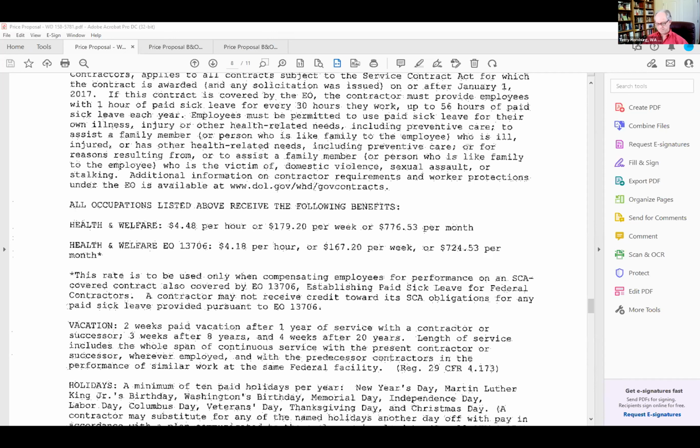Yeah. One, it says, as owners of a construction company, do we have to go by that wage determination if we're the only ones doing the work? So they're the business owners. If the owners are doing the work, they're not subject to a wage determination. It is for their employees.